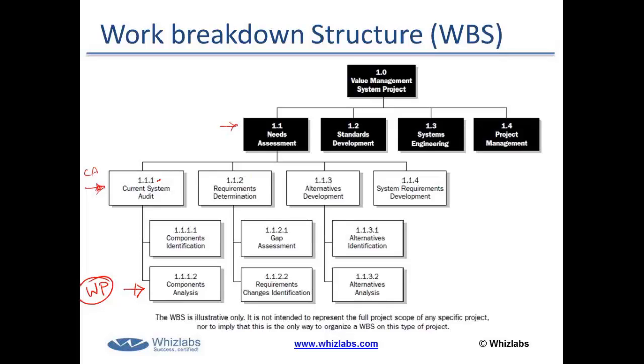So as I have three components here in this particular number, it tells me I would get this work component at the third layer of the work package. So this kind of a numbering system is called code of accounts. Any question, guys?